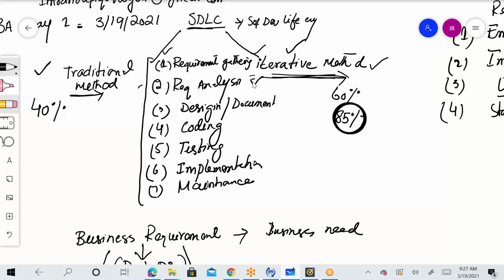When we did the analysis, we found that due to limitations of the tool we are using to design this software, and the timeline, we were not able to give two major functions. So you have to analyze the requirement. Is it possible to design? Is this requirement complete? Can we test this requirement once it is designed? How useful is it going to be for the application or for the business users? After all this analysis, you finalize the scope: this is what we are going to finally deliver.